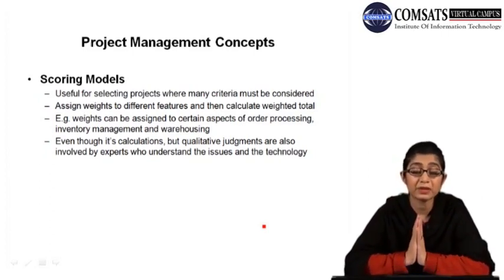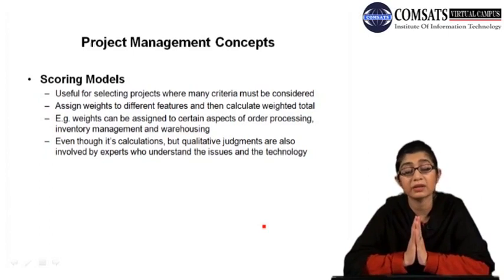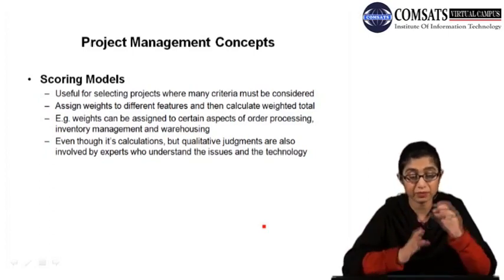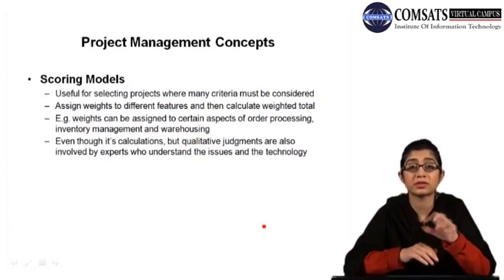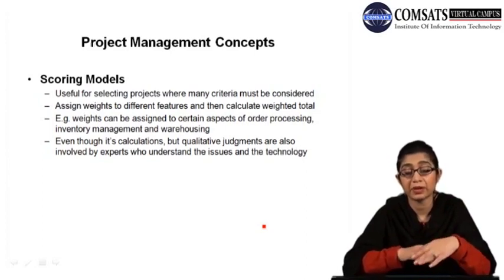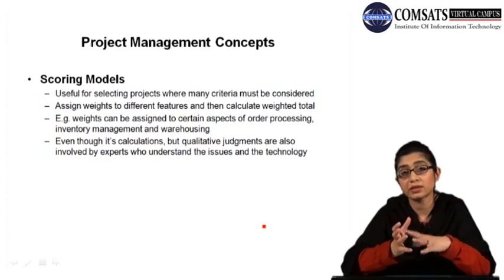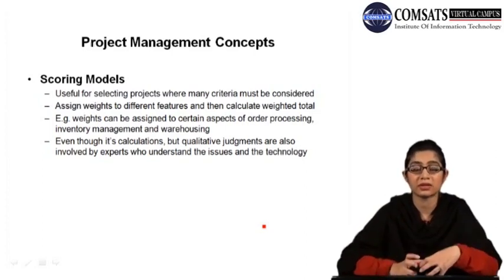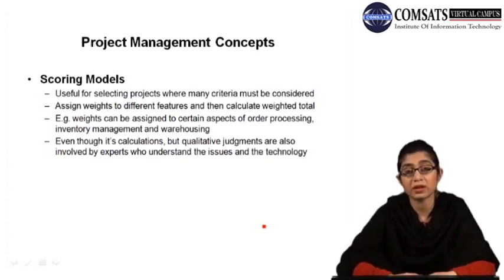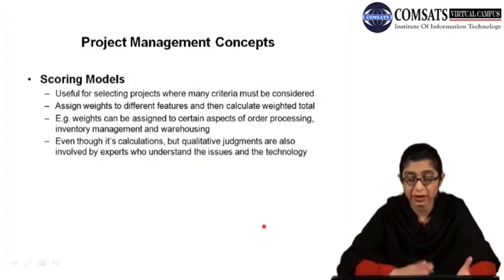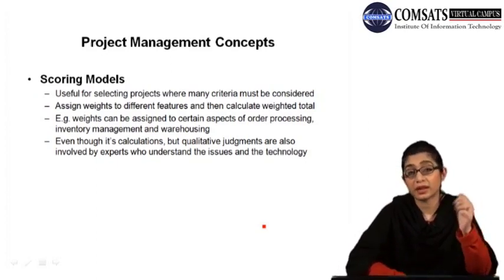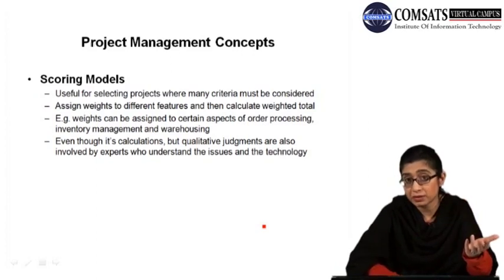What are scoring models? It is useful for selecting projects where many criteria must be considered, and different weights are assigned to different features, and these are calculated. So they calculate the weighted total of a certain system, and according to that they're going to implement the system. Again, the criteria are defined by the management themselves.